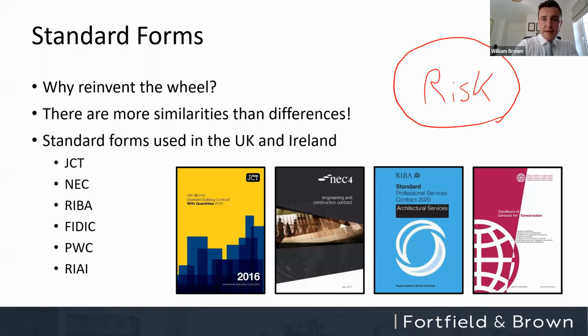The general point is this: if your contract doesn't allocate the risk, the general position is that the risk lies with who? And that's a question for the audience. If your contract doesn't expressly allocate a risk, generally speaking, who takes that risk? Michael's got the answer right. Famaz has got the answer right. Thomas has got the answer right. Everyone, unfortunately not. The general position is if your contract doesn't mention a risk, it lies with the contractor.